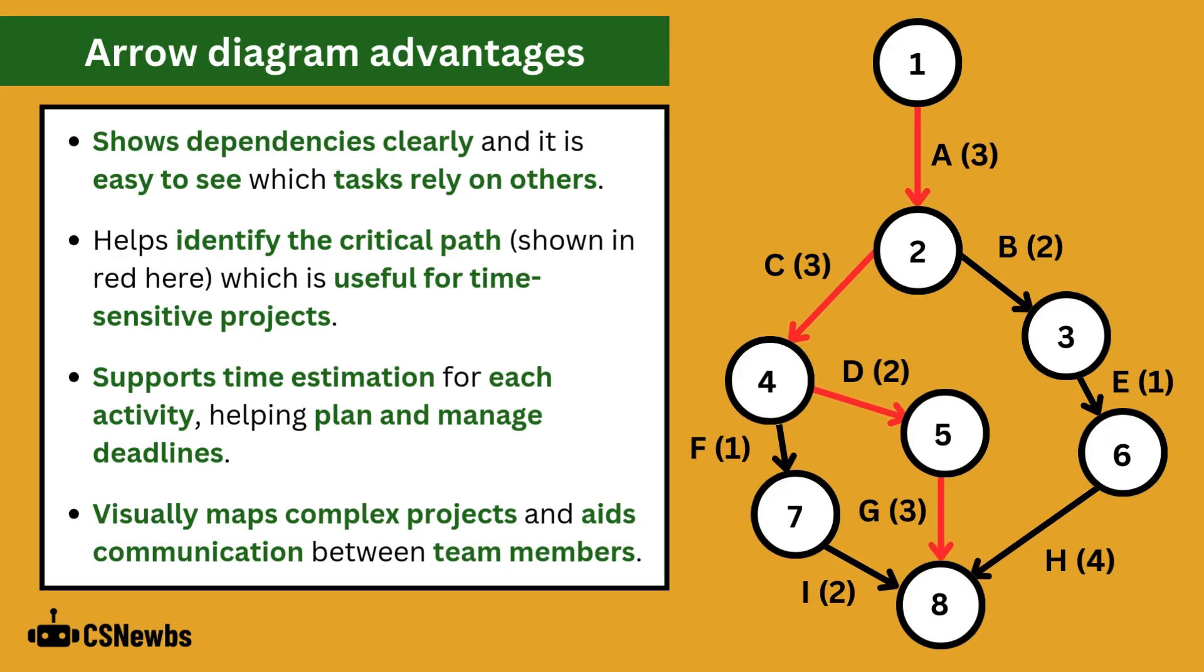Advantages of using the arrow diagram include that they show dependencies clearly and it's easy to see which tasks rely on others. They help to identify the critical path which is shown here in red which is useful for time-sensitive projects as it shows the minimum amount of time that the overall project may take.